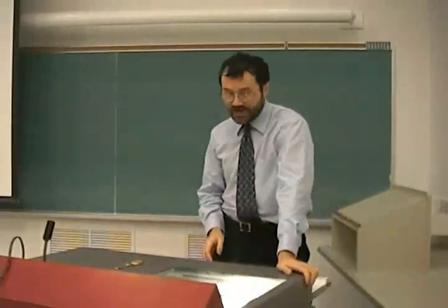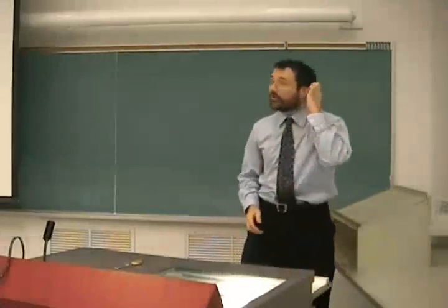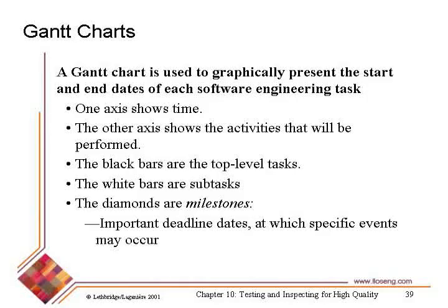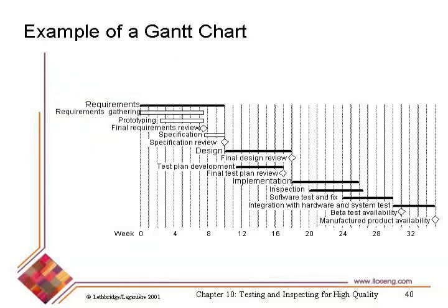And the final type of diagram that is also very important you'll see widely in all the project management techniques, and it's used practically everywhere, is the Gantt chart. Very simple chart to understand, and you should typically always create one if you're doing a project of any complexity. It basically shows time moving from left to right. In this case, we've calibrated it on weeks, and then the various activities that we're going to be doing,